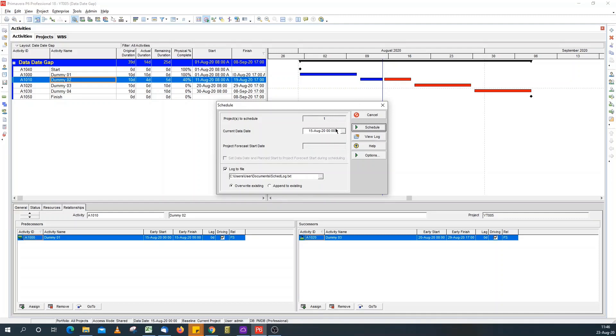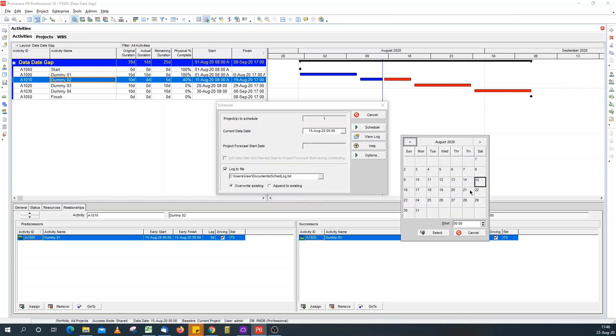To solve this, to remove this gap, all you need to do is align the time of your data date to your calendar start time.